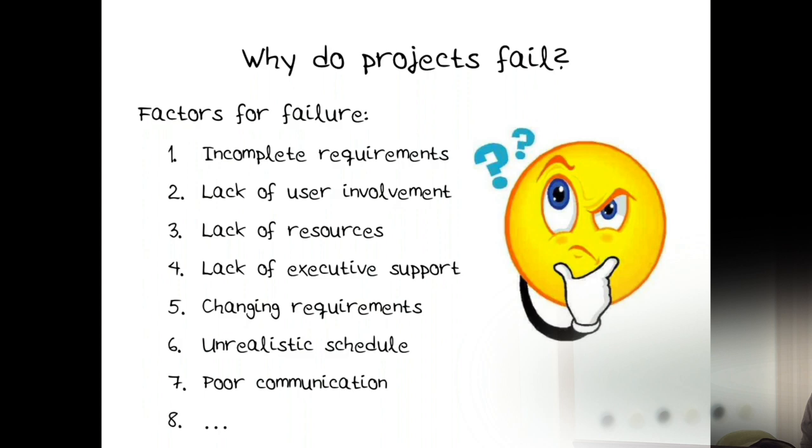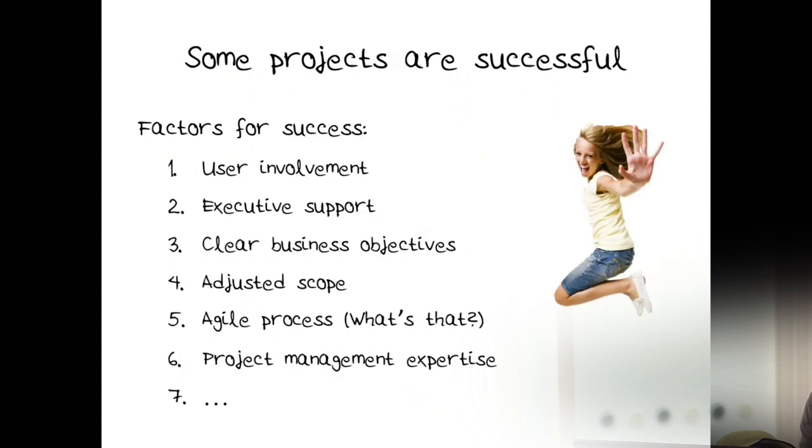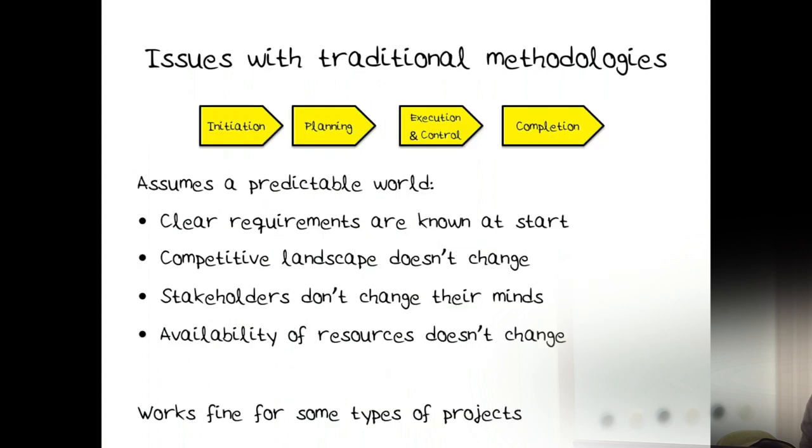Then they asked, okay, but those projects that succeed, why do they succeed? User involvement, executive support, clear business objective, being able to adjust the scope, agile process, and management expertise. So with that in mind, we will look at this again. We have the initiation, the planning, the execution, and then the completion.